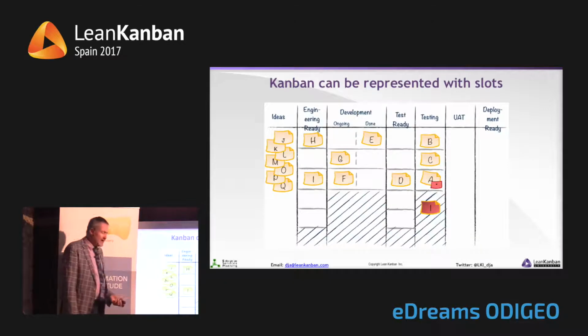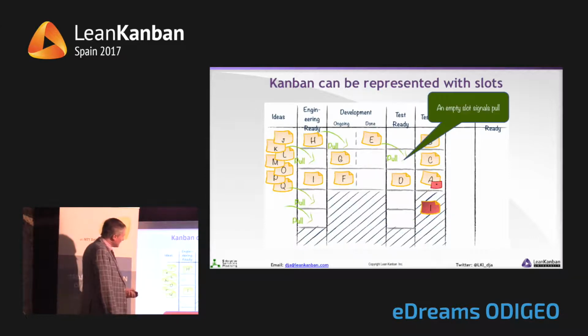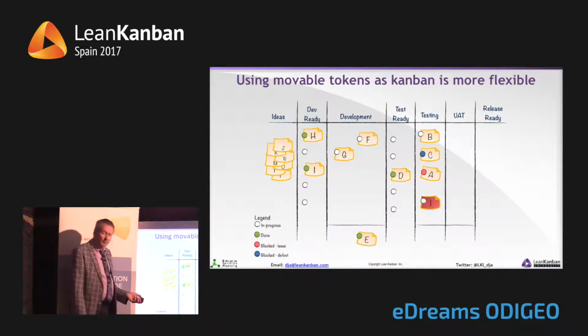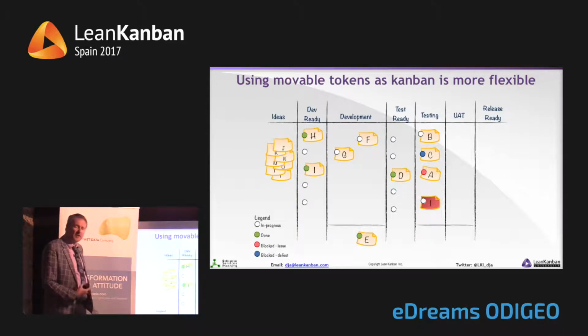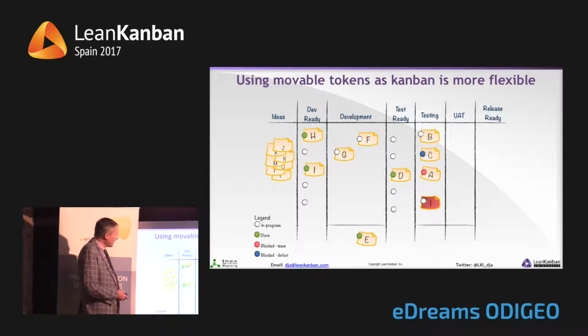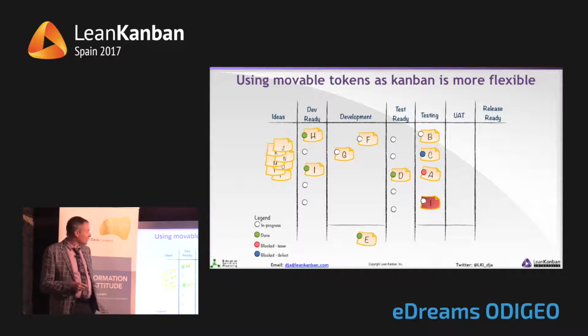Then we get to real Kanban boards, this style of board where you use the physical space on the board as the Kanban. So the WIP limit is the number of slots on the board. And then there's this style of board where you use something like magnets to represent the Kanban. You'll see this in the Tupelo case study. And this style of board first became popular in the Netherlands and then some other parts of Central Europe about 2009 or thereabouts.